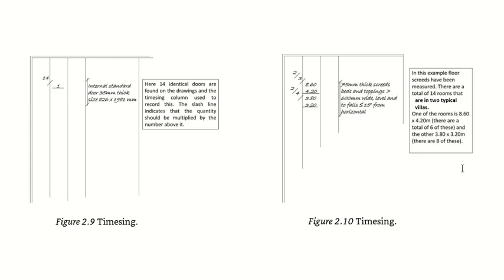Okay, so you see a 2, then a slash, then a 4, right? After every number we are putting a slash. So 2 into 3 into the whole thing. You have to multiply them. Whatever is in the time sync column will be multiplied. If there is only 14 here, I multiply 14 with this one. If there are 2 numbers here, I will multiply both of them. So 2 into 3 into the dimensions.